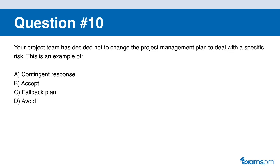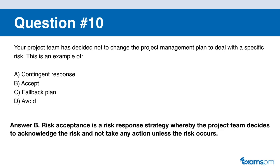Question number ten. Your project team has decided not to change the project management plan to deal with a specific risk. This is an example of: A: contingent response. B: accept. C: fallback plan. D: avoid. If you said B, you are correct. Risk acceptance is a risk response strategy whereby the project team decides to acknowledge the risk and not take any actions unless the risk occurs.